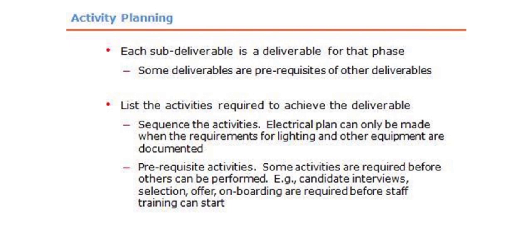Defining the activities involves identifying the deliverables at the lowest level in the WBS, level 3, which is called the work package. Decompose the work package into smaller components called activities to provide a basis for estimating, scheduling, executing, monitoring, and controlling the project. Documenting the work that is planned to be performed.